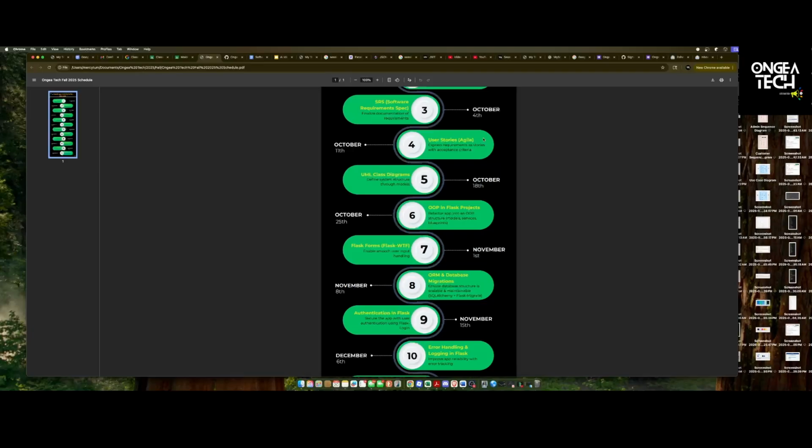From there, we do a retrospective and see from what we have, is there something we can do better? How does it look? We've done tests. Is it okay to deploy? And then once that is done, we go to the next small chunk of work.